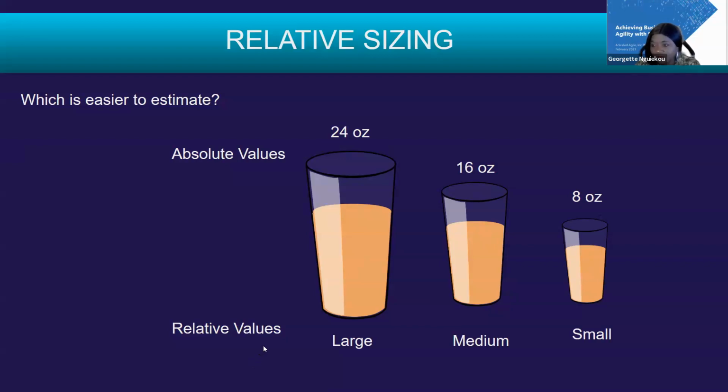So there are 2 ways of doing the sizing. We use the t-shirt size for feature and above. So whatever is feature, that means big body of work, feature AP, they use t-shirt sizing to size that. When it comes to story, they use story point. So this is t-shirt sizing.